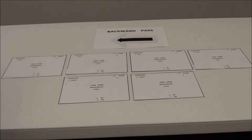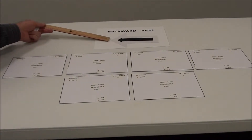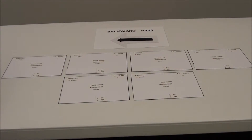When scheduling a project you don't always get told a start date and have to calculate the finish date. You quite often get told this is the date the project will be finished, then you start with your finish date and you work back. Hence we then have a backward pass. We would normally do one or the other — we would not do both. We are determining the start date for the project and the end date for the project.